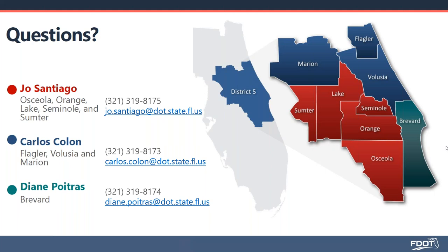The next question from Promise is, should payroll reports be included as backup with these invoices? And the answer is yes. That would be included for salaries. If a component of your payroll report is being requested for reimbursement, then that should be your expense backup documentation.